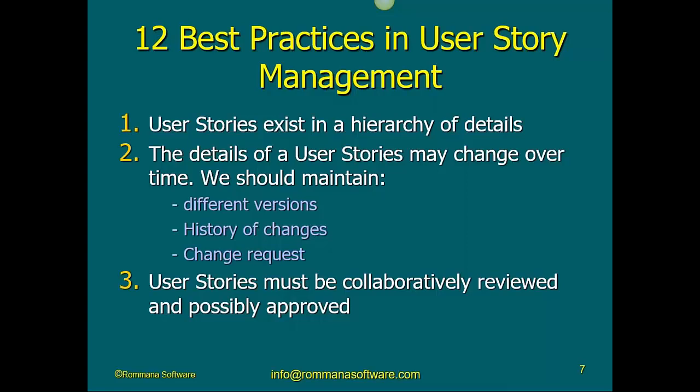Okay, user stories must be collaboratively reviewed and possibly approved. How many of you work in Agile projects where you approve the user stories? Now, I work closely with some of the companies in the biomedical industry, and I know what it means for a requirement or a user story to be approved. In fact, the FDA and the ISO standards would not approve your product if you do not have a way in your requirement management or user story management to approve the requirement or the user story by certain people within the organization.